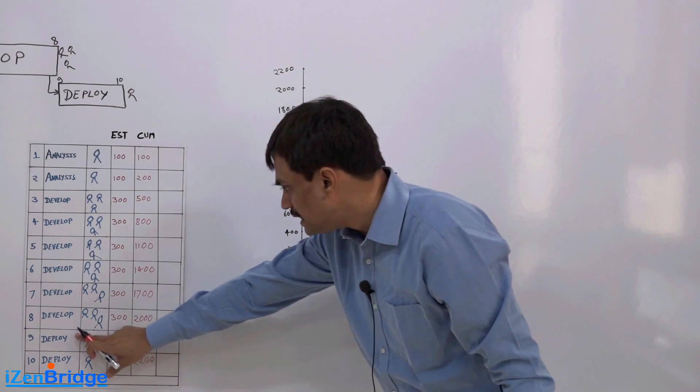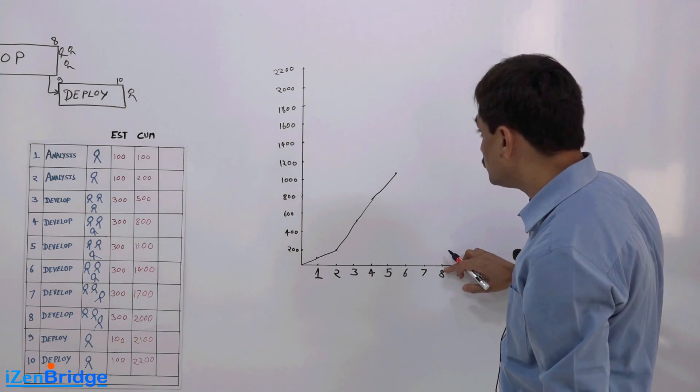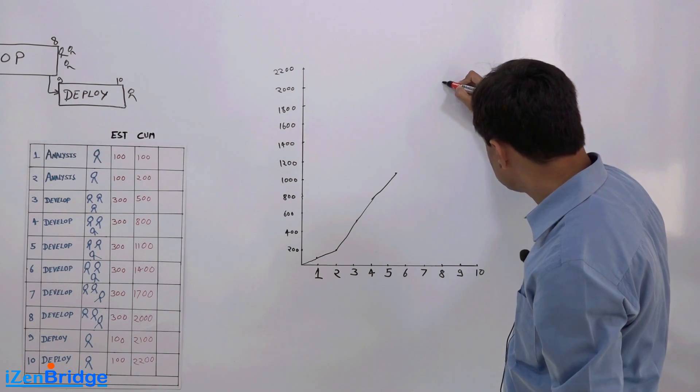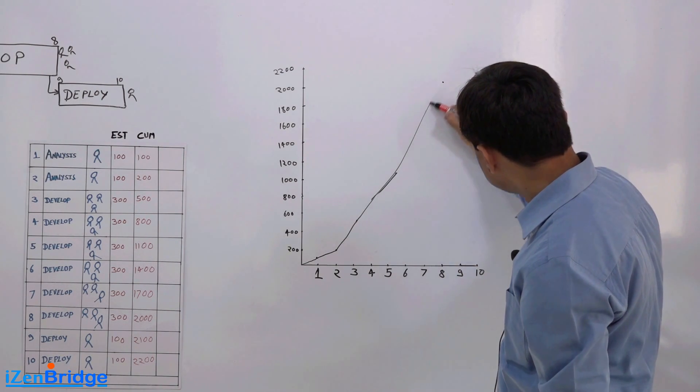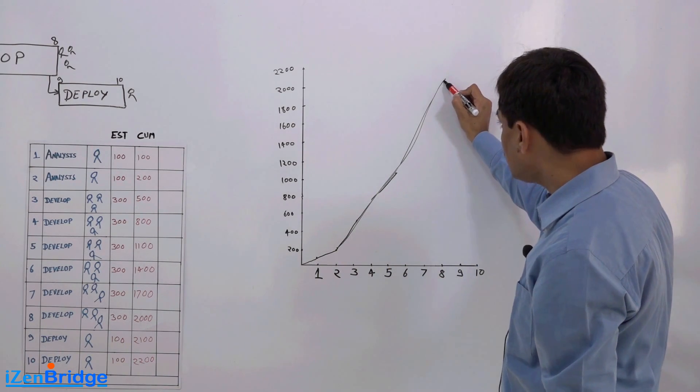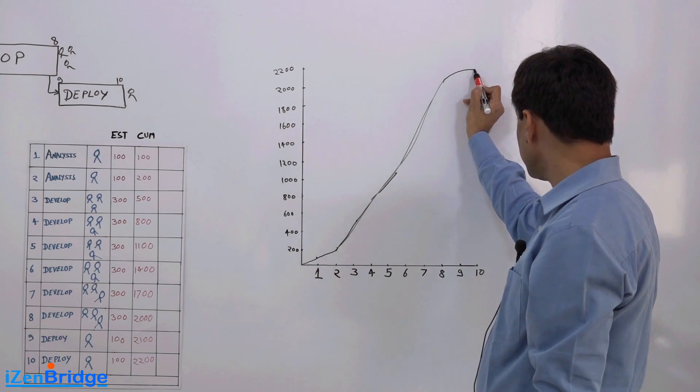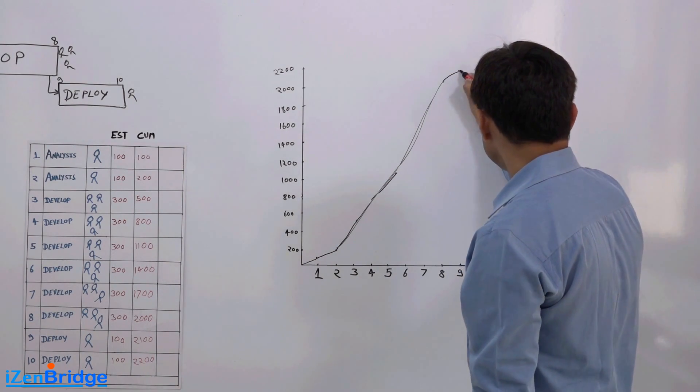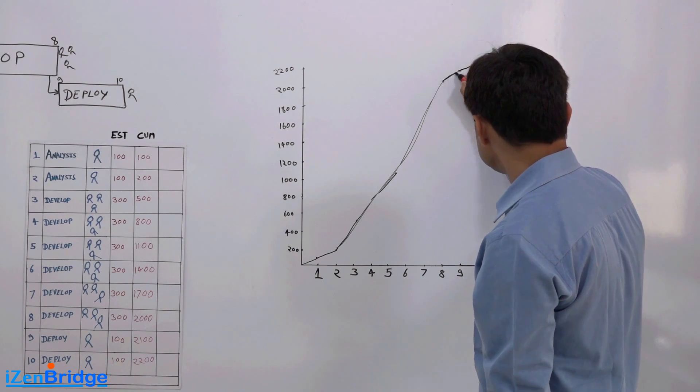By the end of day 8 I'm done with 2000. Then for the remaining it becomes like this because day 9 is 2100 and day 10 is 2200. So the slope is reducing.